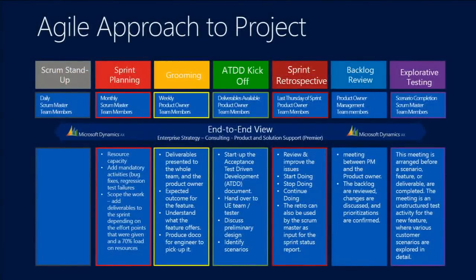Just a couple other things on the benefits. One of the things that we've seen is that you're going to have discovery through this process. And so you need to plan in the future CRPs some amount of time to handle the discovery from the previous CRP and make sure that you're accounting for it before you move from one CRP to the next. But the benefit there is you're doing that as you move along, and it becomes sort of incremental changes, and it becomes a pattern of behavior and acceptance for the customer because they know they can actually make the improvements, and they'll see them the next time around.